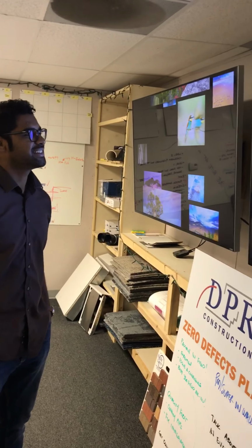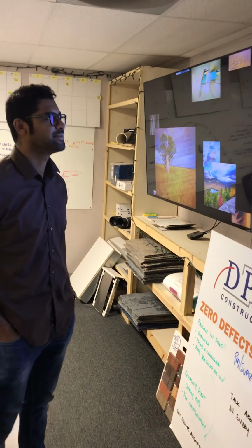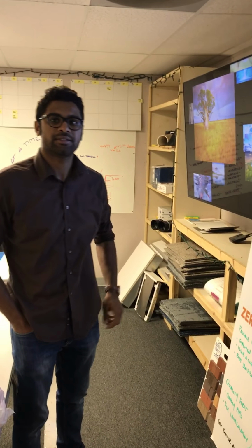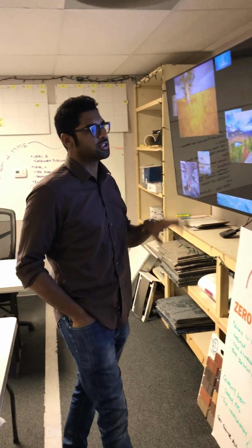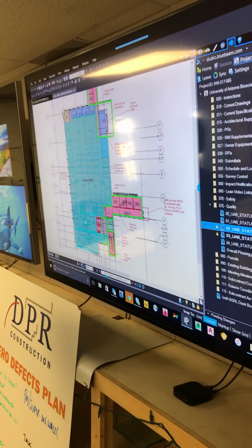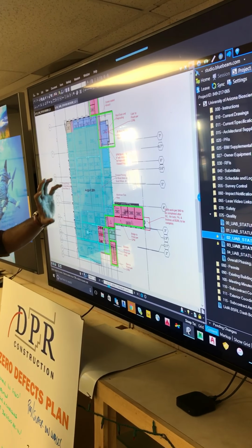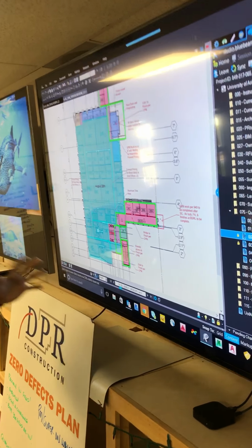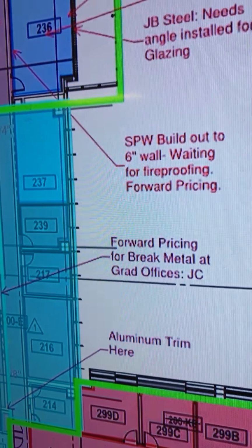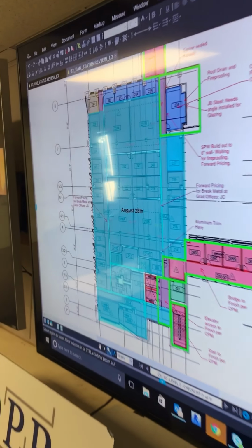So Rizwan, can you show us your idea here? The beginning of it came from VUMCP, but we've adapted it to our job site. So go ahead. This is basically the visual tool, phasing drawings for each area. What we do is put in roadblocks for each part of each week, and have this discussed during the last planning meetings, and how we can come up with a plan.